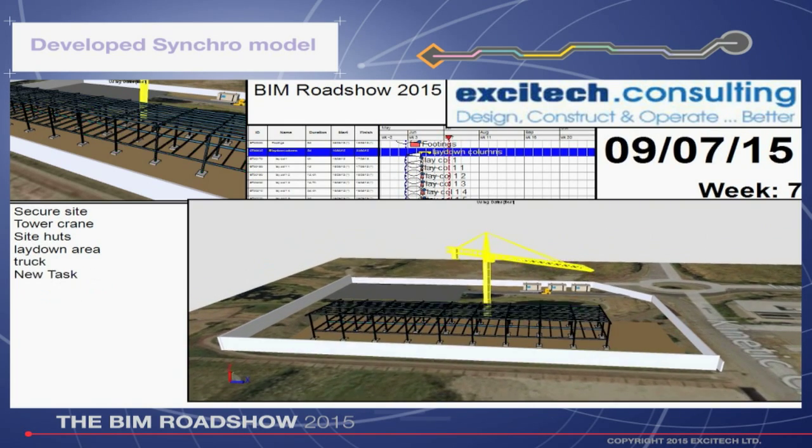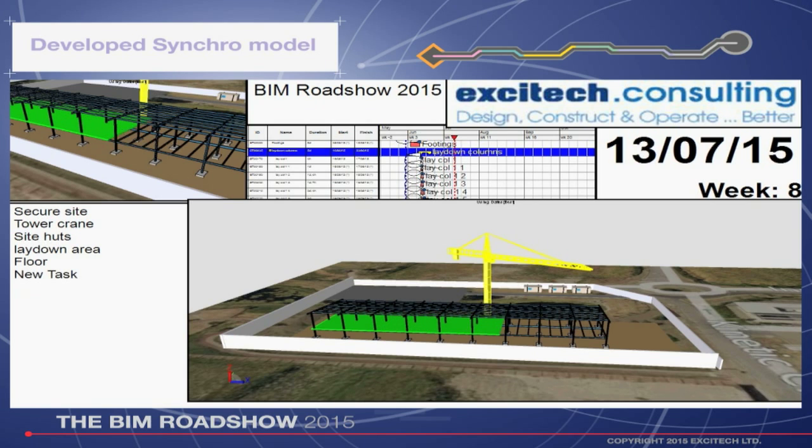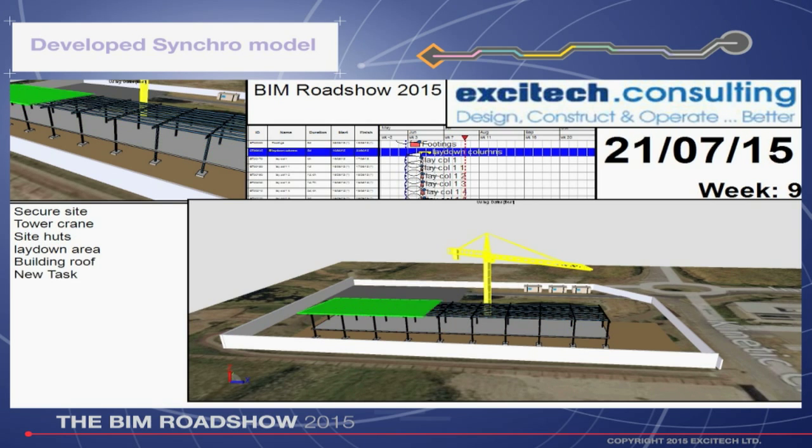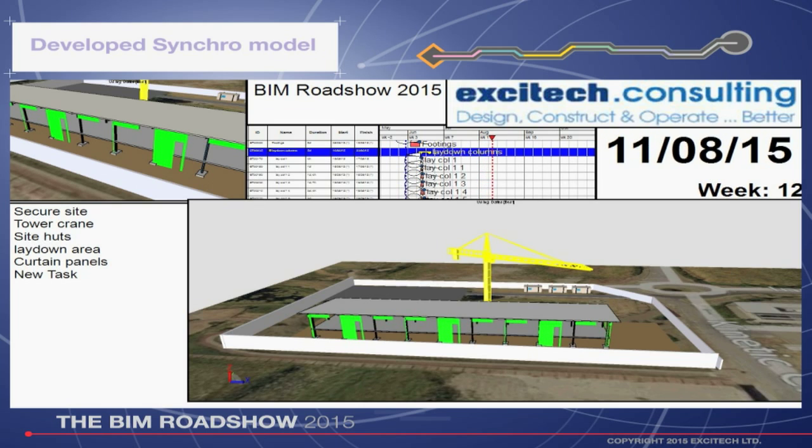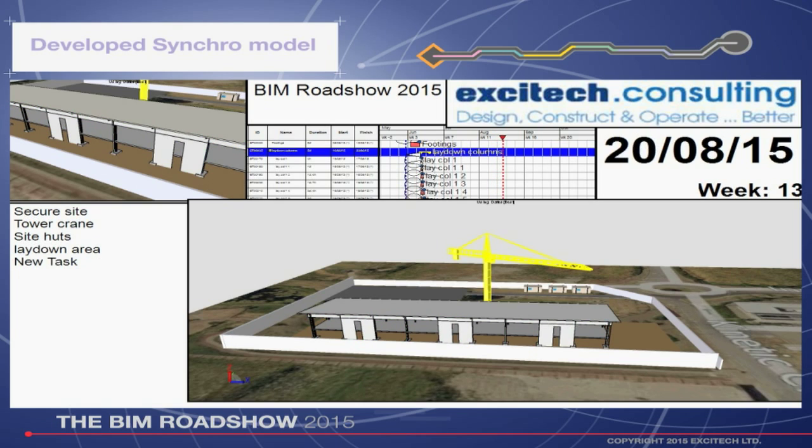Now, it's tools like this I use every Monday morning to get my team together and show them what activities are going out on site that week. They're aware of what scaffolding is going up on which facade to do certain jobs. They know not to work in that area. So it's improving my health and safety issues on site. People are aware of the activities that other team members are doing that week. And it's also proving detail.